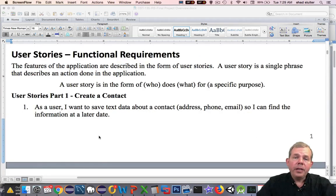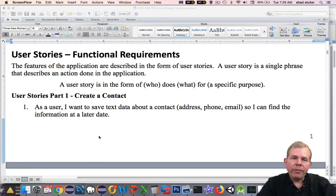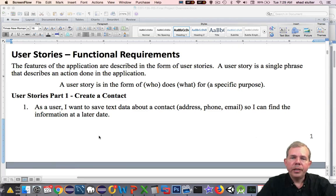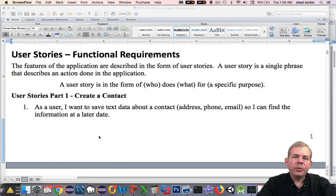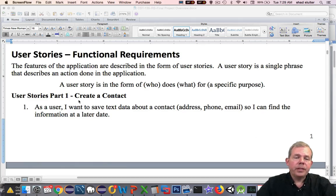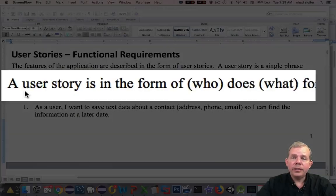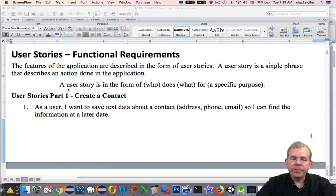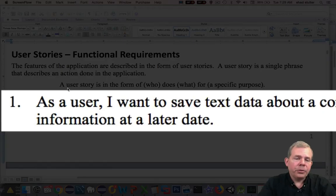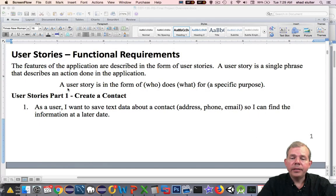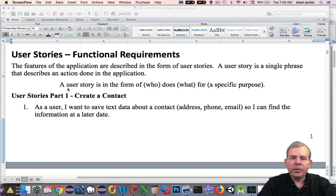The first section that you'll see in our document is called user stories. User stories are a good place to start if you are trying to figure out what your user wants you to build. Pretend that this is actually for a client that wanted the custom app. You don't get to invent the requirements. You have to find out what your user wants, and a user story is how you do that. A user story is written in the form of who does what, and it has to have a reason. For example, as a user, I want to save text data about a contact, which includes address, phone, and email, so I can find the information at a later date. A very simple statement that describes the core functionality of our program.